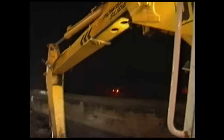South of Thirsk, one of the longest single-span bridges to be made was put in place over the 4 running lines during a single weekend. In the open countryside, it was often a simple blasting job to demolish a bridge. In built-up areas, like the last few miles of line into Edinburgh, it was necessary to take down bridges piece by piece.